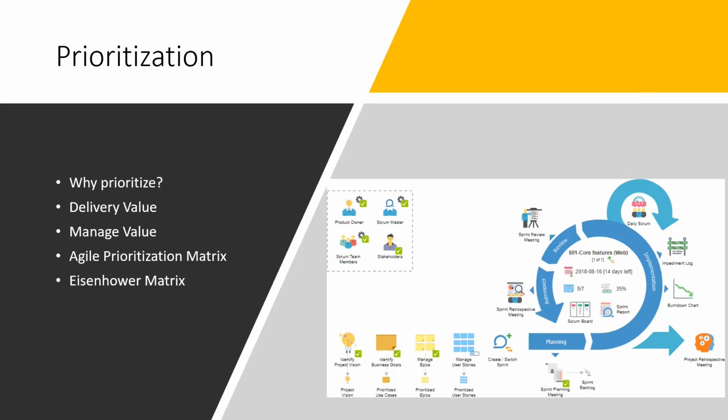Some people call it iteration 0, but I personally call it an initiation phase, which exists in waterfall. It also exists in agile, but the case in agile is that this particular product backlog need not be complete. The product backlog keeps getting updated as we go through the project. Within a week, you'll have a good priority of user stories that need development. And these user stories keep on getting added and prioritized as we go through sprints.